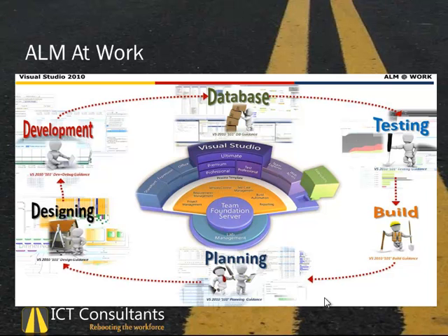The development team that gets requirements from the designers, they are building the requirements right because this is the new situation. But when they deliver the software to the testers and the testers are testing against the old situation, we have a problem. There's a problem of consistency. Then we are stuck. And it will be very, very difficult to migrate right away. And it costs a lot of money. There is nothing better than to be clear and to be efficient from the beginning. I would like to see a problem or a change or something like that in this stage or in this stage rather than there. When I say there, I have to roll everything up. It's too expensive. Right? Okay.